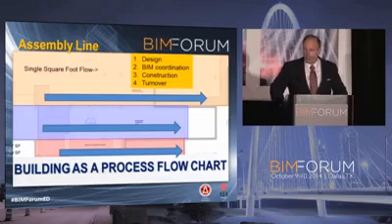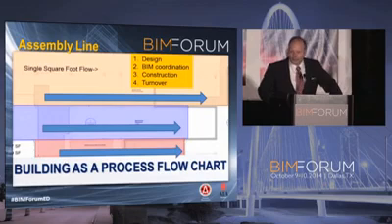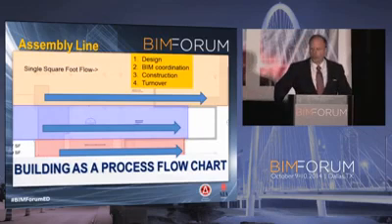So back to our assembly line approach, and taking a look at swim lanes and looking at how the job is set up. Most contractors look at the flow of work. And this particular job was a hospital. We looked at that level of complexity. The orange section is the procedure rooms, blue is admit and recovery, and the red is a hallway. We set up the design, the BIM coordination, the construction, and the turnover all through those swim lanes, and they followed that same cadence, all the way into the build.